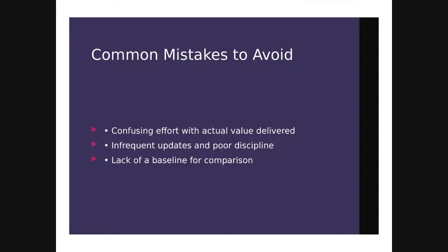And that's why we have earned value to actually look at the scope completed. So if you look at the scope completed and you only got 4 out of 10, then that's your earned value. Your effort is, yeah, you put in 10 hours, but the value you got out is 4. You get what I'm saying?